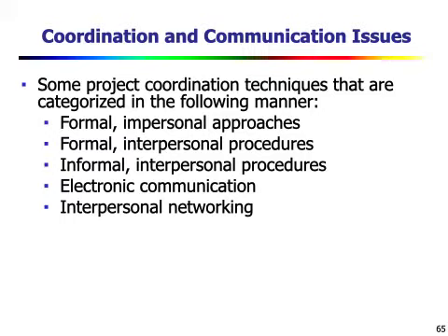So this becomes the first level of partitioning, or these are some of the functions of that particular system that we are going to develop, and each of these features represents a subfunction to be implemented in software, and each of these can be further refined or further partitioned into smaller problems or smaller functions if that decomposition will make the planning easy.